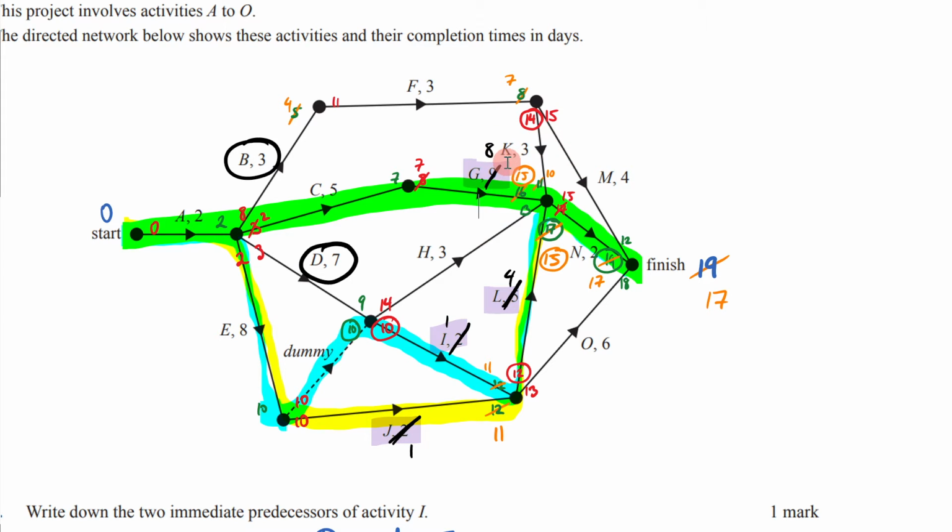And hopefully, by our logic before, you understand why G needs to be reduced. Lots of people, when answering this in the exam, forgot to reduce G. But remember, once we had pushed through all our reductions here and ended up with 15, if we didn't reduce G, then this would have been 16 and would have been bigger. So that's why we had to reduce this one in order to make sure that that earliest completion time of 17 could be reached. So a little bit tricky there in terms of knowing why G had to be reduced, but that's the thinking behind it.